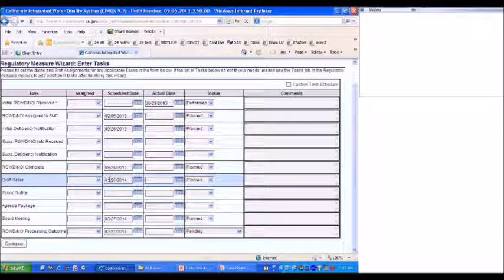So I'm going to say that I know that this will be done in February, and if I click that and make some changes, now nothing changes. The system doesn't override what I've changed because I say, I know more than the system does, don't override. And that's a nice feature if you take the time to make your own schedule.